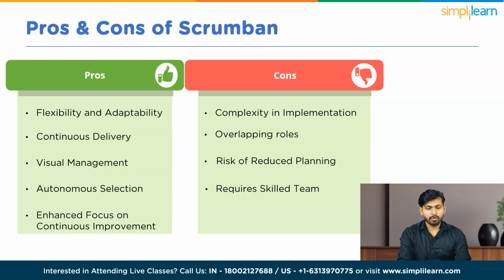If the team lacks strong collaboration skills or experiences difficulties in self-selection, it could hinder the effectiveness of Scrumban. Finally, there is a potential risk of the project getting bigger than planned. The ability to add or reprioritize tasks within a sprint may increase the risk of scope creep if not managed carefully. Without clear boundaries, the team might struggle to maintain focus on the original sprint goals.